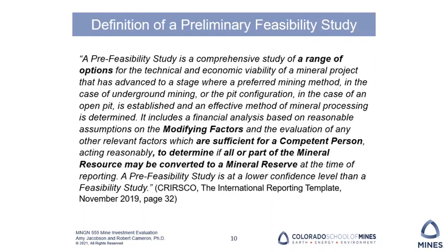They state that a pre-feasibility study is a comprehensive study of a range of options for the technical and economic viability of a mineral project that has advanced to a stage where the preferred mining method, in the case of underground mining, or pit configuration, in the case of open pit, is established and an effective method of mineral processing is determined.